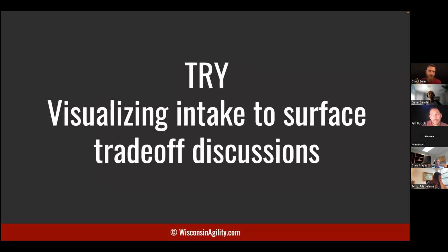And that really goes along the lines of, again, thinking about Scrum, one team and LeSS. Your product backlog being a single ordered list is really a long-lived capacity limiter, right? It's limiting the WIP. It's making you work at the capacity that you have, the number of people organized around that backlog definition. Very similar for everyone familiar with LeSS, right? The broader you go with your product definition, the more focus you have on your backlog, which brings, again, you're starting less work. You have less work in progress. So it's going to impact your cycle times positively. It's going to bring all the other values that come with focusing.